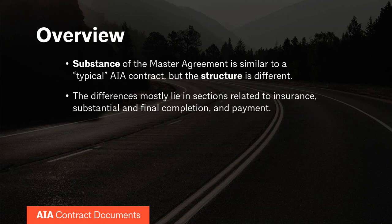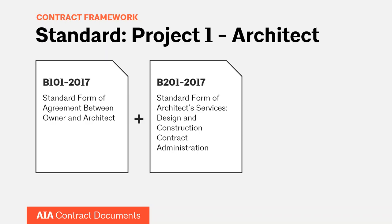The differences in structure and substance mostly lie in sections related to insurance, substantial and final completion, and payment. Looking at what you're more traditionally used to seeing: you might have a standard contract for a standard project — what I'm calling project number one — between an owner and an architect. You might have a B-101, your owner-architect agreement, and attach to it the B-201 for design and construction contract administration services. Together, they form the contract for the first project.